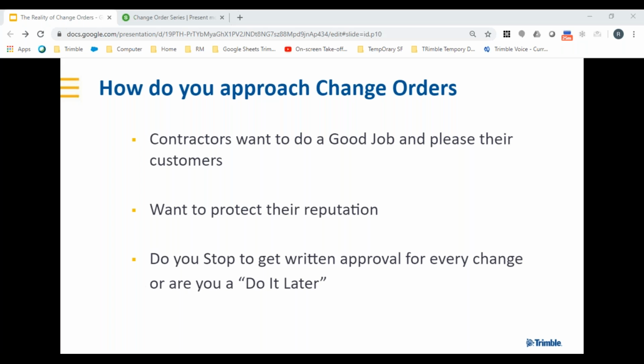And we've also shifted the power into the client's hands on negotiation because we've already made that commitment, and we don't really have any recourse to go and pull that piece of equipment out or whatever. I've heard a lot of us say, I'm just going to go and jerk that service off that building. He never paid me for it. Obviously, you'll end up in jail. But a lot of this can be, once again, avoided if we simply issue those changes. And remember, you're doing them a favor as well. You're letting them know the valuation of what that is so they can then make an informed decision on whether they really need that change that they think they do in their project.